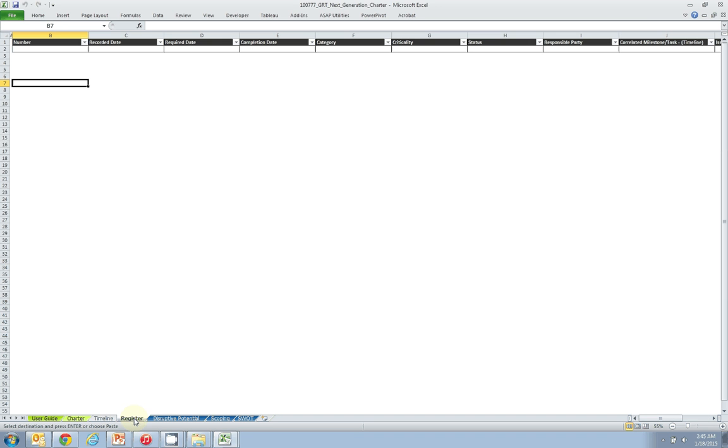Last worksheet is the Register worksheet. The Register worksheet serves as a project management log for activities related to the current project. The table is structured to capture activities to include related record dates, statuses, related timeline milestone, issue identification, and action plan to address the activity identified. Please use the Register to journalize developments in the project that require explanation. This worksheet is basically a guide and a tool for project managers to record events that occur within the project.